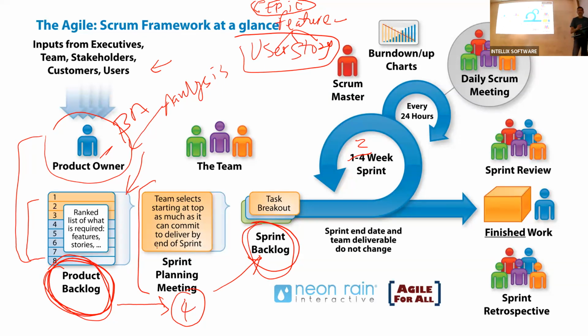Now, the meeting that I'm discussing could be 2 hours to 4 hours. Okay, on Monday mornings. Maybe it starts at 9 o'clock and goes to 11 or 12 o'clock, whatever. That is typically called the sprint planning meeting. It's planning what we can do as a team, what we can deliver as a team. So that happens Monday morning, and they'll pick out sprint backlog items on Monday morning.